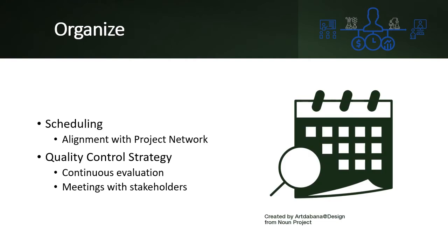Scheduling will be managed with work package assignments. These work packages will need to be standardized across the project. Starting dates will be determined by the project network. There is some flexibility in scheduling with activities that are not on the critical path and have slack time.